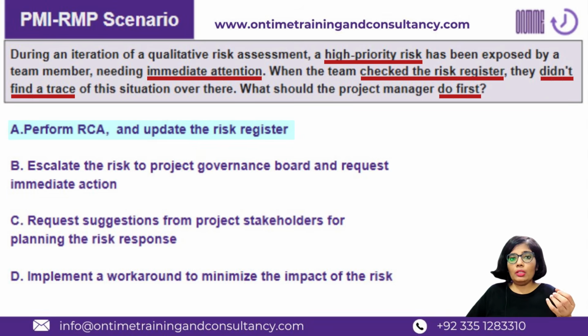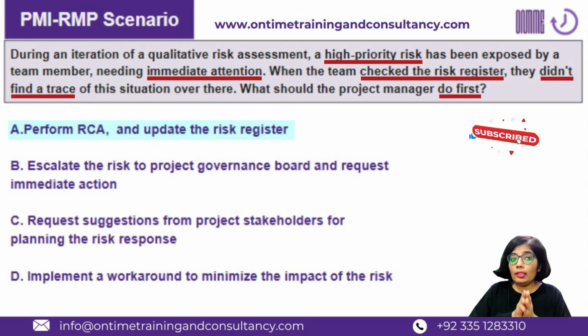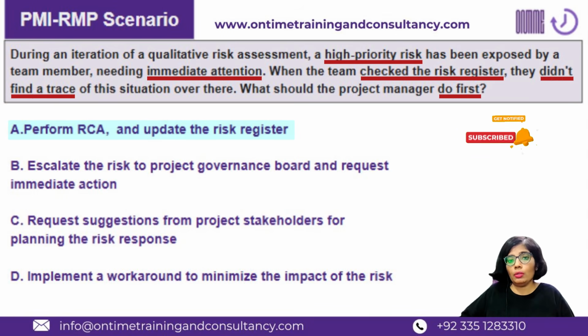If the situation demands an urgent step, urgent action, because that's the need of the time, you will not go to RCA as the first step. This question is asking for the first step. In this case, you will not go to RCA as the first step. Yes, there's a later step for sure.